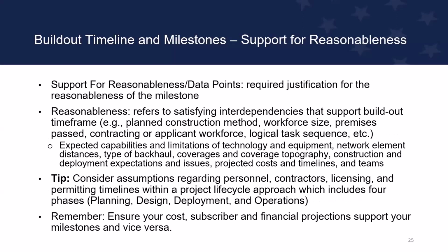Next slide. So support, reasonableness. You want to provide justification for every milestone. You want to refer to all the build out interdependencies, the planned construction method. You want to show us what's your workforce size, how many premises are you passing, are you using contracting or force count labor to do the work? So we want to see it all in a logical sequence.